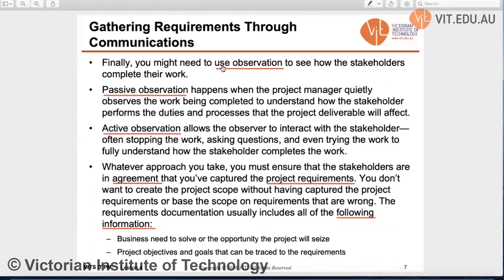Finally, you can use observation to see how the stakeholder completes their work. Observation can be done by both passive and active methods. For passive observation, the project manager quietly observes the work being completed to understand how the stakeholder performs their duties and how those things affect the project deliverables. For active observation, the observer can interact with stakeholders — stopping their work and asking questions to understand how the stakeholders actually complete the work.